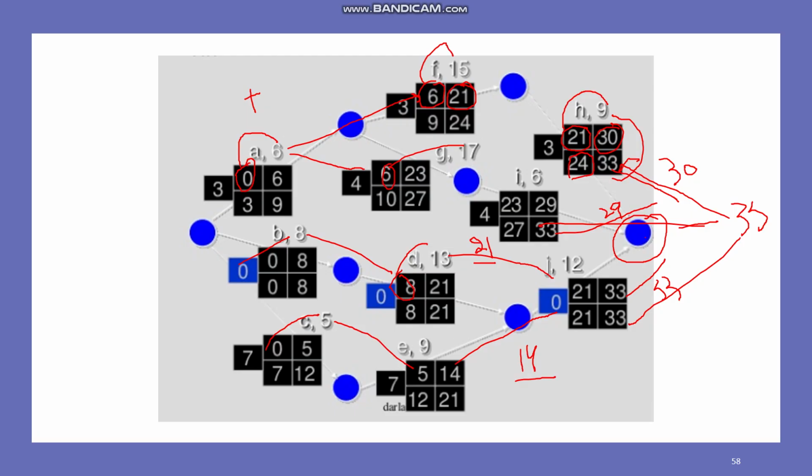For example, if you look at here, we have 23 and 27, so they both are different. So you can have slack time of 4. You can delay the activities for 4 days. You can delay the activities 3 days. If you look at this one, there is no slack time. So it means this is important. And if you have to identify the critical activities, these will be the activities that have zero slack time. All the zero slack time activities will become the critical path.